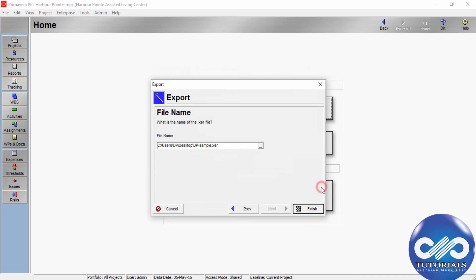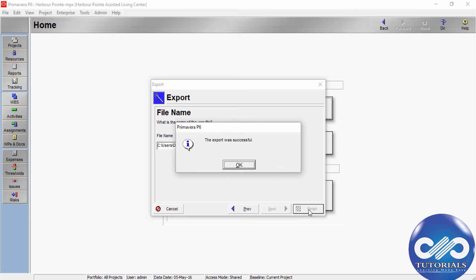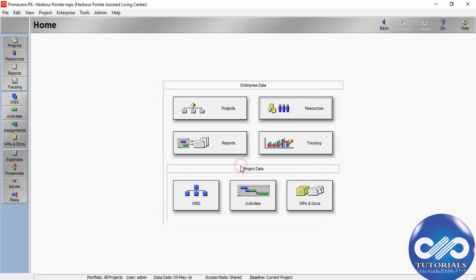available in the PM module, like budget data and EPS, financial periods, funding data, issues, issue codes, risk roles, thresholds, project codes, portfolios, relationships, etc. This kind of data present in the Primavera P6 XDR file won't be present in the Primavera Contract file.